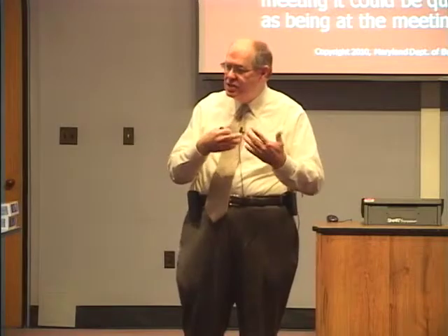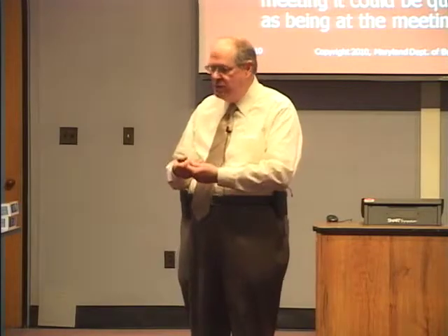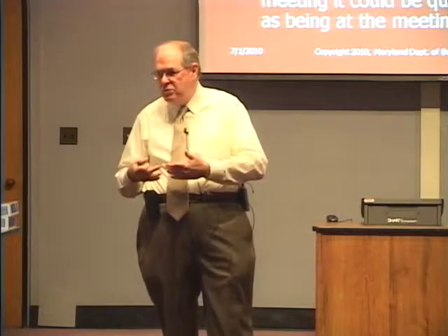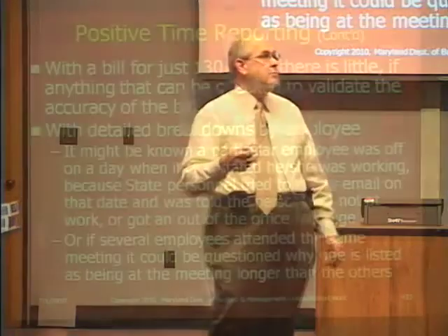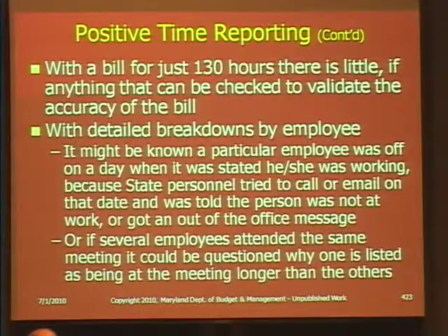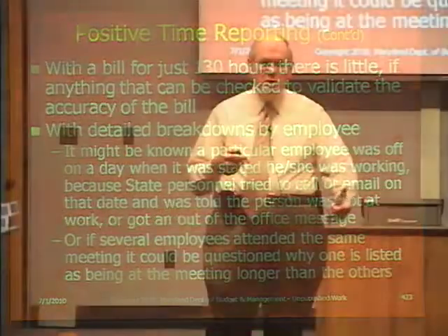But again, they have to say something positive and make a statement that that is the case. You at least have some ability to question it because you have something that you can at least check to see whether everything seems to be okay with what they're submitting. Out of the office reply, or if several employees attended the same meeting from the contractor, it could be questioned why one is at the meeting from 2 to 4 when the other two are at the meeting from 2 to 3.